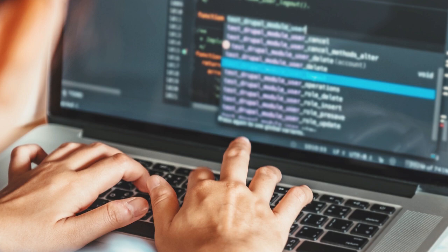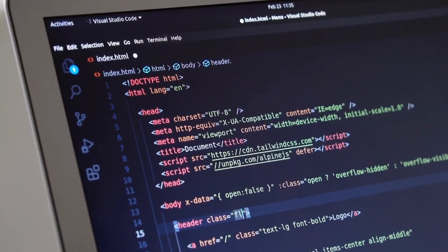Next is implementation. Here, technical implementation begins as soon as the design is ready. This may be the shortest stage of the waterfall process, as careful research and design has already been done. During this phase, the programmers program the application based on the requirements and specifications of the project, and some testing and implementations are also done. If significant changes are required at this stage, it may be deemed necessary to return to the design phase.